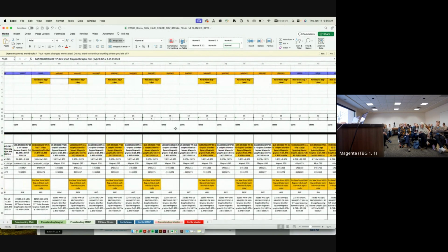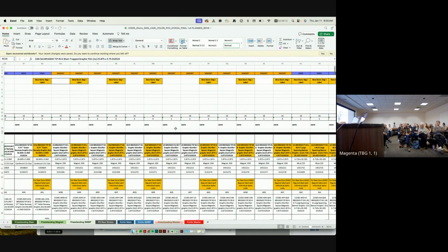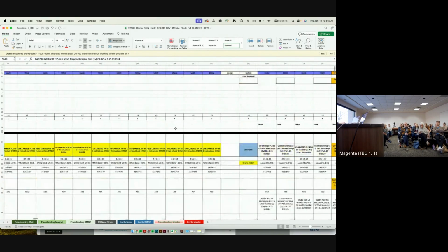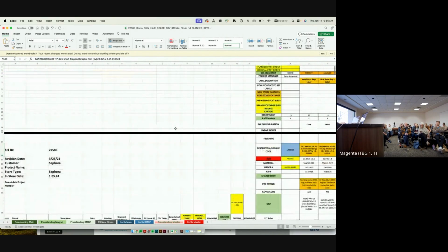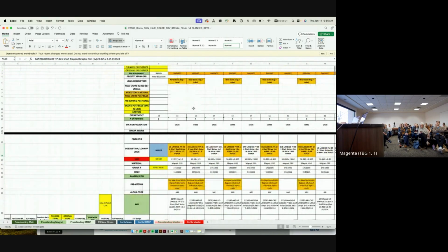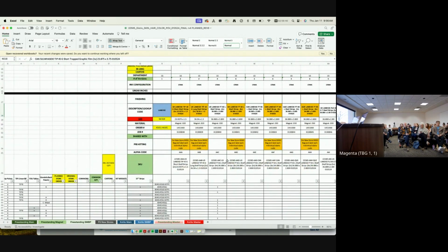But just a note on that too, that is 1 business day once it's actually entered. We have to do all of these steps prior to giving them the 1 business day. Yes, exactly. So it's not just 1 day. Right, exactly. After looking at this, it could take a few days. And then we still have to plug all this data into a billing sheet too. And that can take some time, especially if it has to be broken out by assortment and by country and by coal. So just another thing to bear in mind, especially if we have common parts on here, because if they're common on here, technically we still have to break them out as individual items by assortment. I'm sure you guys have to do that too, but just something to bear in mind.